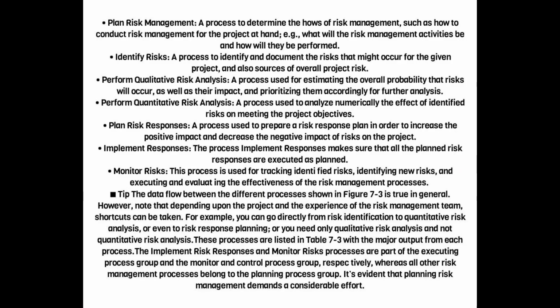Plan risk management, a process to determine the hows of risk management, such as how to conduct risk management for the project at hand. Example, what will the risk management activities be and how will they be performed? Identify risks, a process to identify and document the risks that might occur for the given project, and also sources of overall project risk. Perform qualitative risk analysis, a process used for estimating the overall probability that risks will occur, as well as their impact, and prioritizing them accordingly for further analysis.